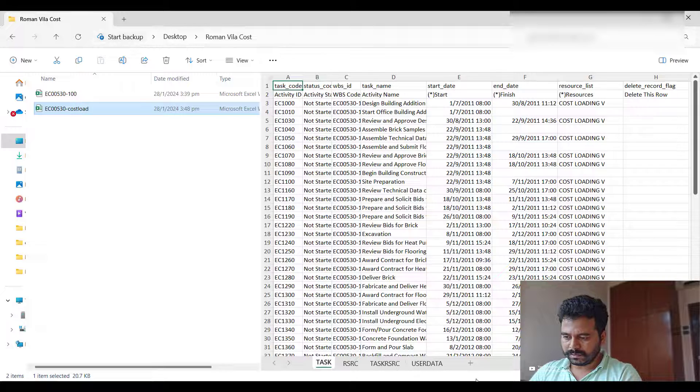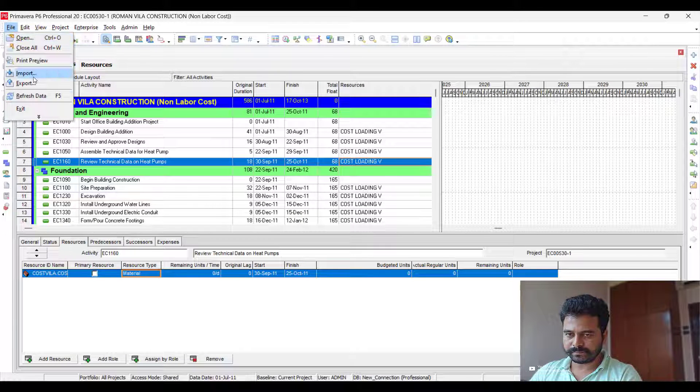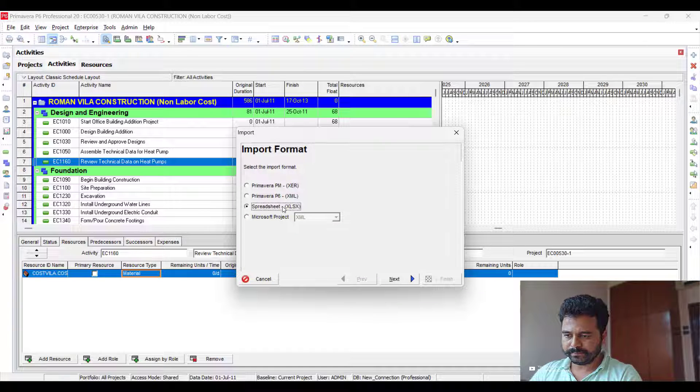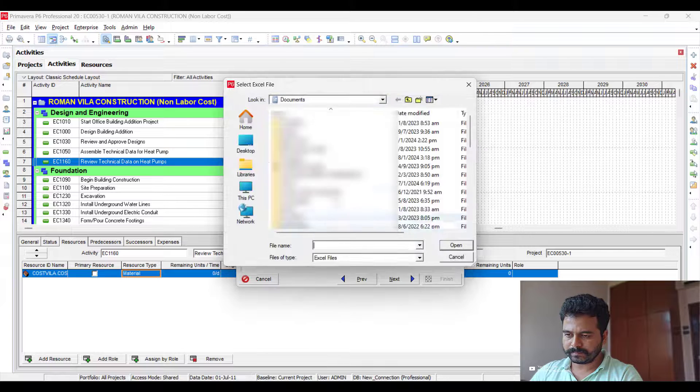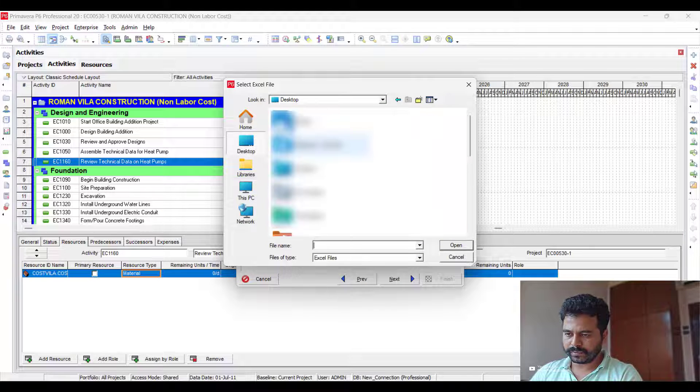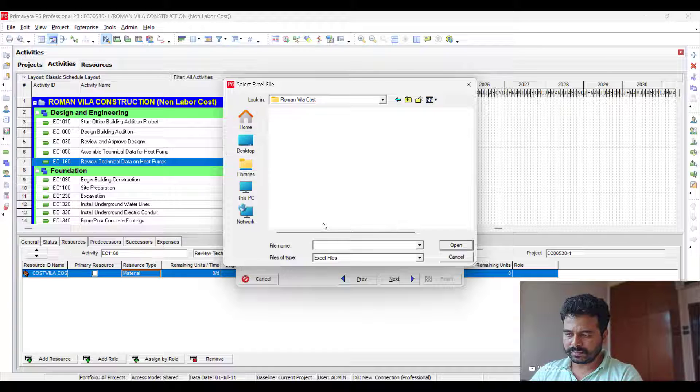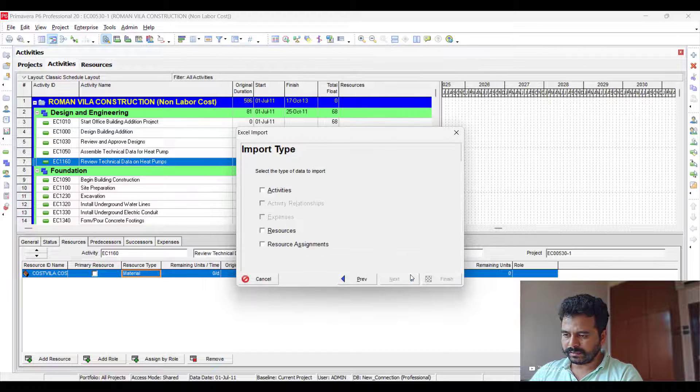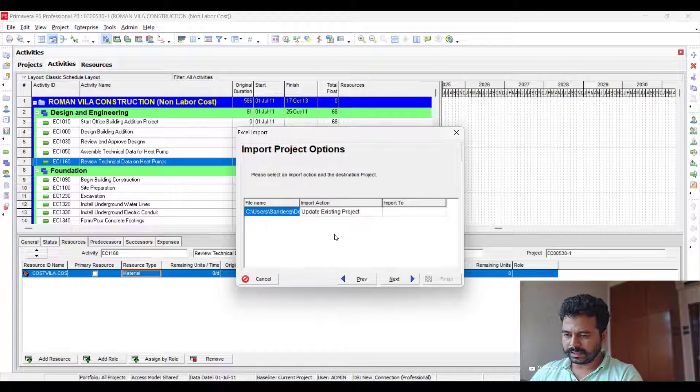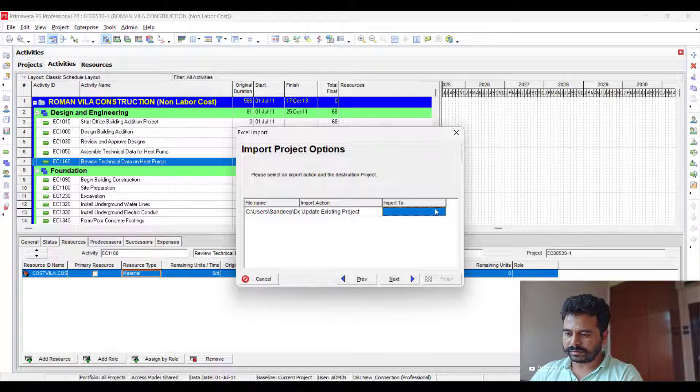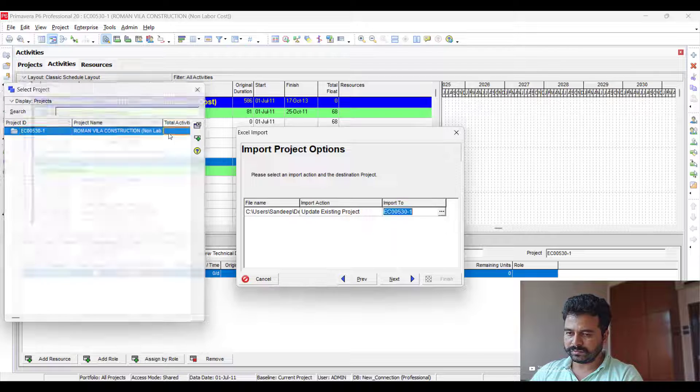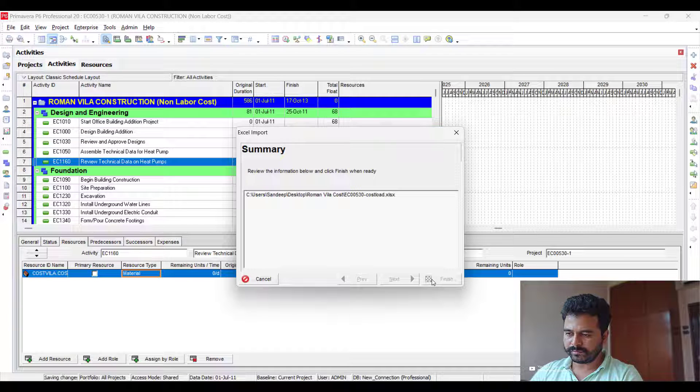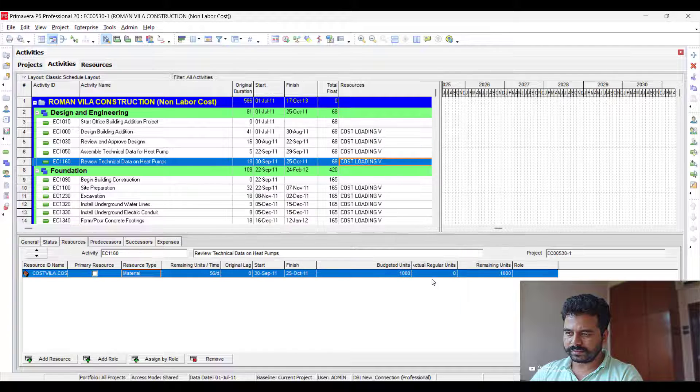So I'll go to P6 again and import the Excel. Go to Import, select the file 'Easy Cost Load', click Next, click all this, Next, then Update Existing Project. Yes, we are updating the existing project, so select the project. Once it is done...